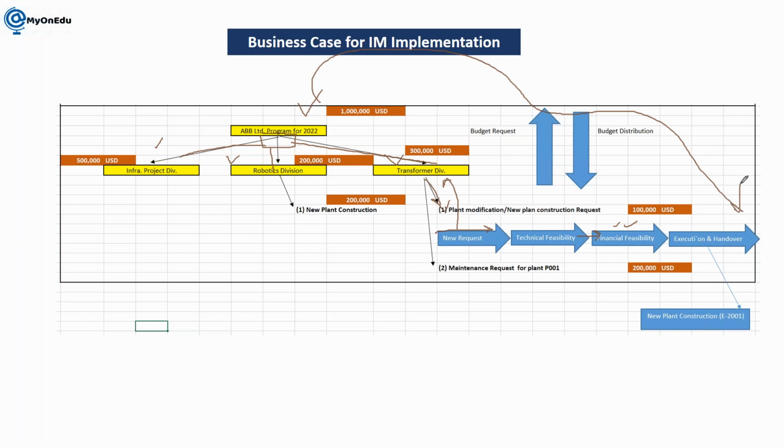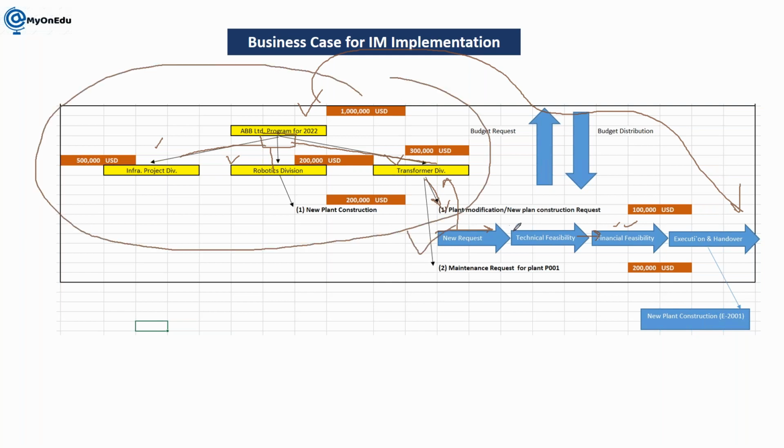So understand the concept or the flow here. This is your master data, this is your initiation. Here planning values will be rolled up to the program. From program, once it is approved as a budget, you can distribute, and once it is approved, the project will be attached here. This is your project. And budget will be distributed from your positions to the project. Clear? Yes.